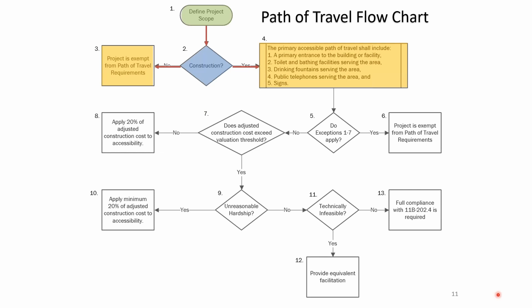The flowchart continues at box five, where there are exceptions. In section 11B202.4, there are 10 different exceptions. Box five covers exceptions one through seven — if any apply, your project is exempt from path of travel. The project itself still has to comply to code. But triggering those toilet rooms and other path of travel elements — you'd be exempted if you qualify for those exceptions.